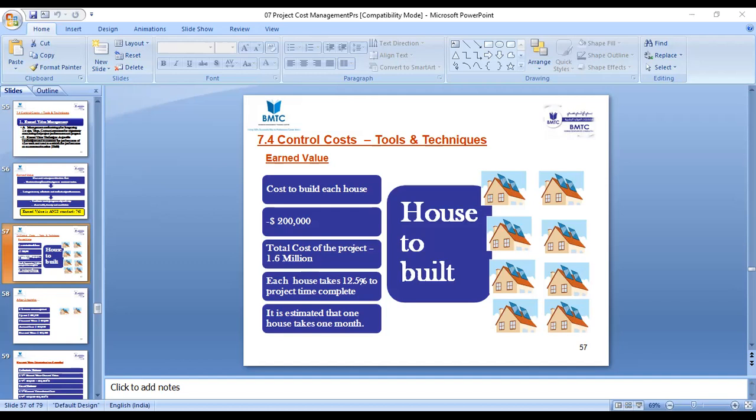If a negative variance comes, then you have to take a corrective action after you've done a depth assessment. You need to go to the root level to know why this impact is happening, why it is giving a negative variance, what the reason and root cause for it is, and whether there are any supplying causes affecting the project by giving the negative variance. And what you have to do to remove this variance, how long this variance will stay in your project, and where all the other areas are getting impacted. So you need to do the depth analysis.